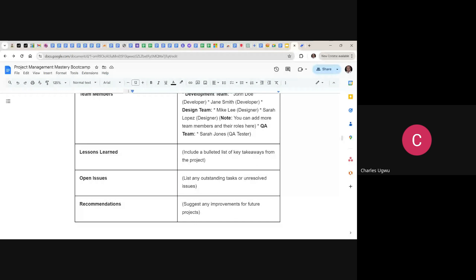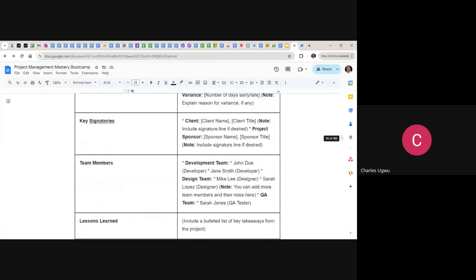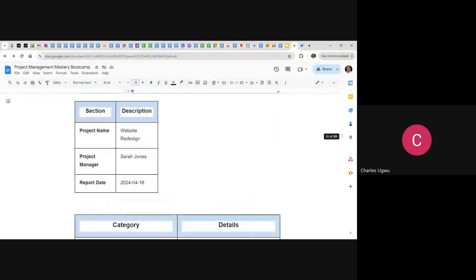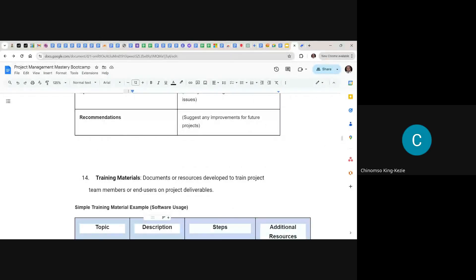Then lessons learned — because the lessons learned document is very large, you can put bullet points or add a link to where the main lessons learned document can be found, or include key bullet points within this closure report. Then open issues: list any outstanding tasks or unresolved issues. Then recommendations: suggest any improvements for future projects. When this documentation is in place, that's what formally brings the project to an end.